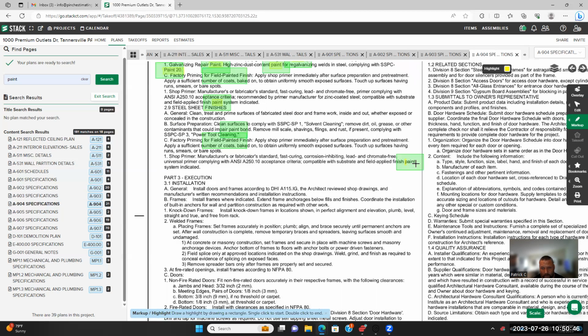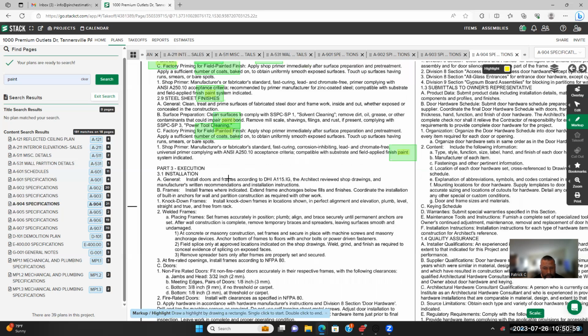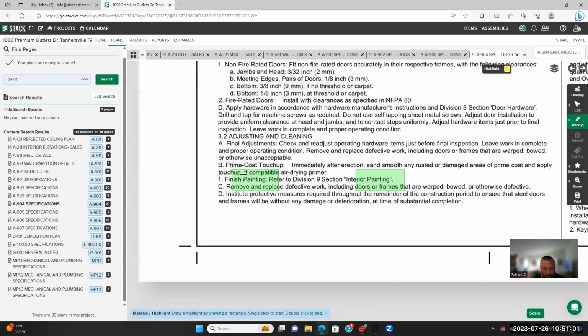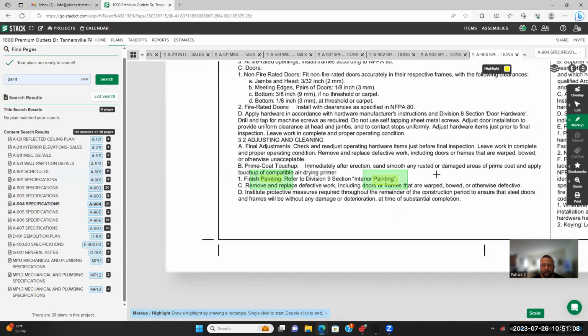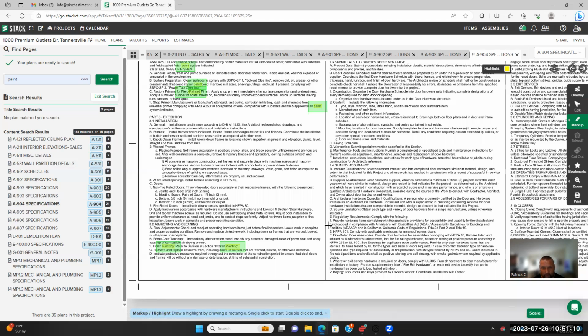And one of the key words probably on this sheet, if it's not on here, another one you could search is warranty. Most jobs, at least a 1-year warranty on your paint. And if there's rust showing through, you're going to be back there painting all the doors for free again. So just keep in mind, factory prime.